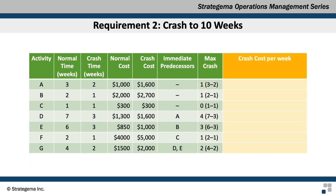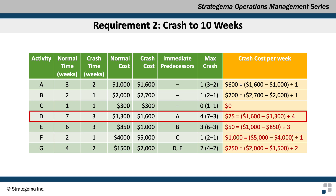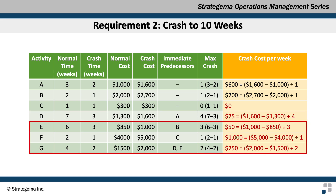Next, we determine the crash cost per week by taking the crash cost minus the normal cost and dividing by the maximum crash time. For activity A, the crash cost per week is $600 ($1,600 minus $1,000, divided by 1 week). For B, it's $700 ($2,700 minus $2,000, divided by 1 week). Activity C has a crash cost of $0 since it cannot be crashed. Activity D is $75 ($1,600 minus $1,300, divided by 4 weeks). The remaining activities have crash costs of $50 per week for E, $1,000 per week for F, and $250 per week for G.